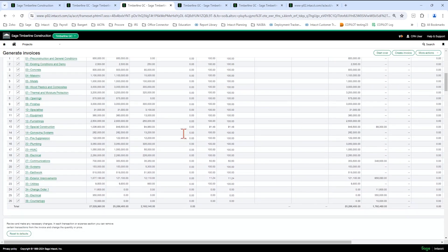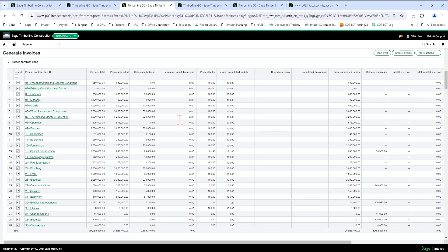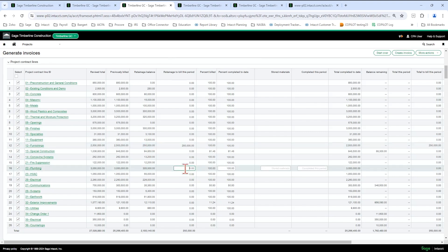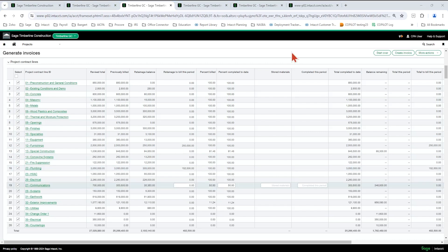I'm going to come down here and here's where I'm going to release my retainage. So if I want to bill my full $250,000, I'm going to type in $250,000 right here. So don't forget that Sage Intacct does allow you to do math in a cell. So if I wanted to do just half of this $305,000, I can do that times 0.5, for example. And all I did was type $305,000 times 0.5 on my keyboard. Hit enter. And now I've got my $152,500.